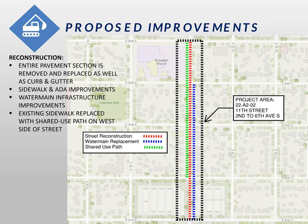Shown as the blue line, Moorhead Public Service will be replacing their water main on 11th Street South from 3rd to 6th Avenue South. The existing water main is cast iron and needs to be replaced. There are also some lead water services proposed to be replaced under this project. The City and Moorhead Public Service have collaborated, and the City has included this water main replacement under its street improvement contract. This allows the City and MPS to obtain the same contractor, bringing benefits such as easing construction scheduling, consistency, and a less crowded project area.